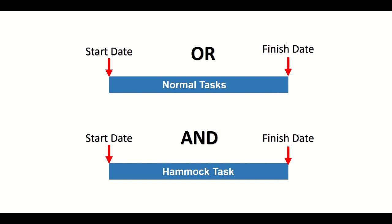Now you must be thinking when this kind of a technique is required in MS Project. This technique is used when the duration of the task will vary and depend on the other tasks. For example, if we are constructing a building, then the tenure of the project manager or site engineer will depend on the entire duration of the project, but not on any particular task.